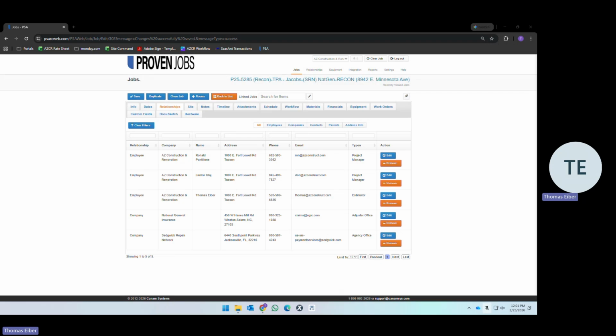If the projects that you're running are going over budget because they're spending too much on materials, multiple trips to Home Depot, it's potentially because you're not spending enough time in the field, communicating specific direction with your workers. If it is a subcontractor, you need to have field oversight on them as well.